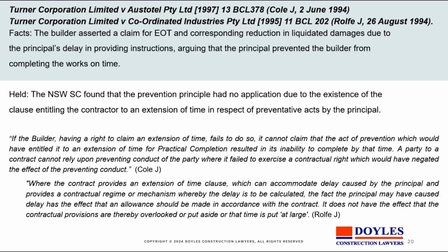A question of Turner Corporation, and in this case, the Supreme Court of New South Wales found that the prevention principle had no application due to the existence of a clause entitling the contractor to an extension of time in respect of preventive actions by the principal. So therefore, where the contractor had not applied and had not satisfied that clause, he was found not to have any release from the prevention principle. The prevention principle is an important principle, but it isn't unlimited, and the terms of the contract will provide whether or not it applies in any particular circumstances.